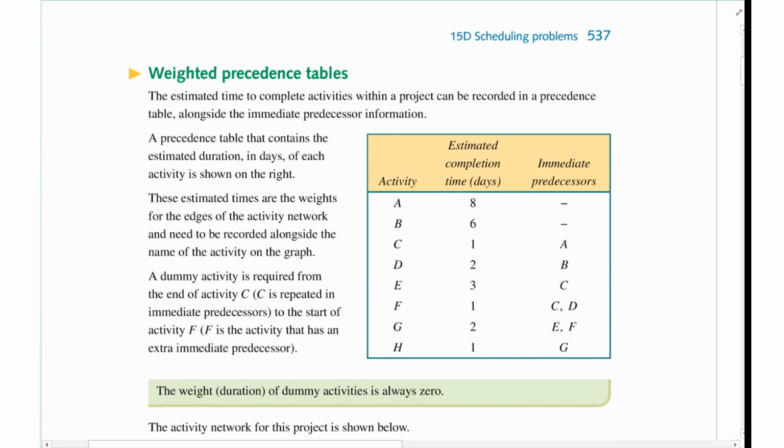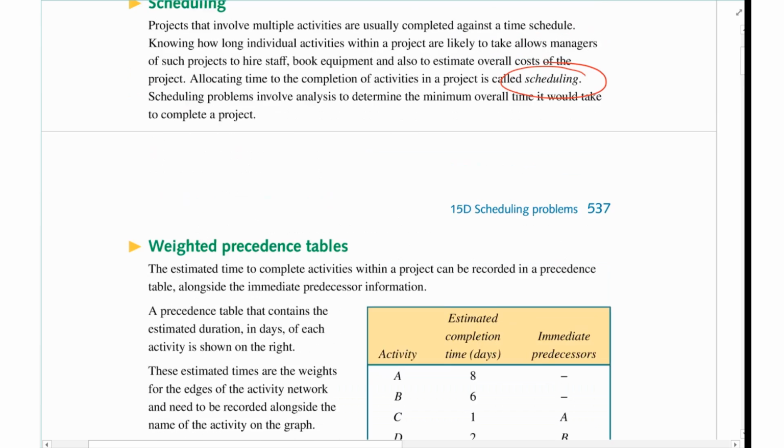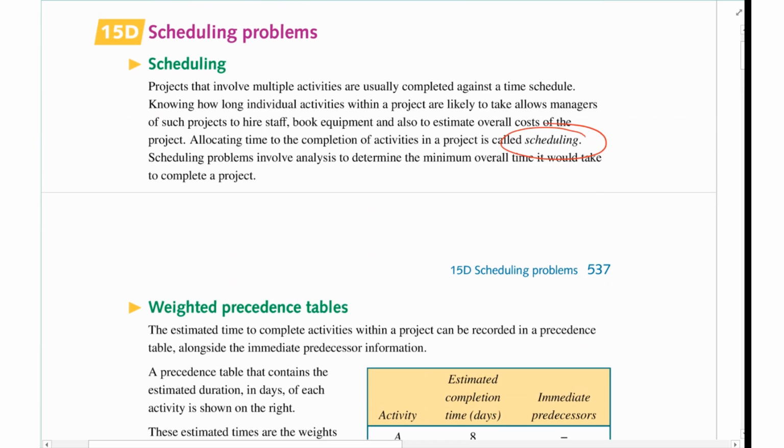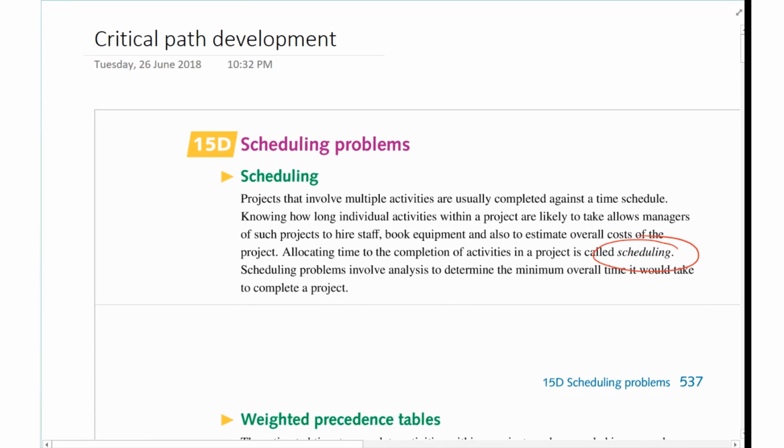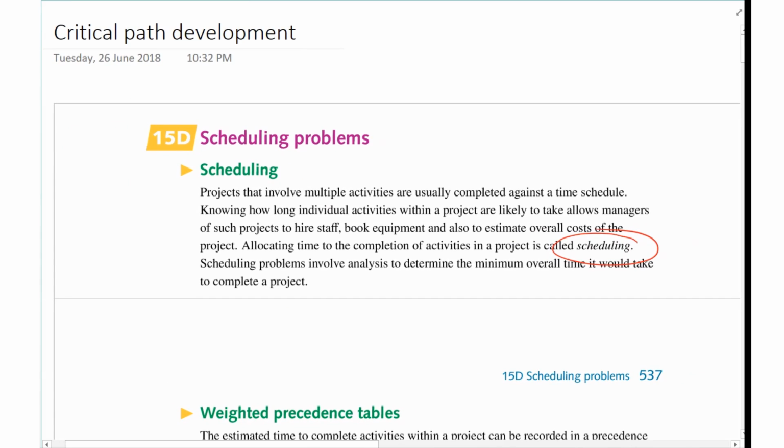Okay, you have these sorts of things occur in a wide range of areas. In building a house, you're going to have scheduling of when plumbers come in, when electricians come in, and when roofers, and when you lay the slab, and all that has to be timed. And when you're doing that, you're basically doing a scheduling problem, which is you need to work out where the critical path is. Where is that point where there's no give? It has to occur at that time for things to move forward. Okay, so that's what we're going to be looking at.